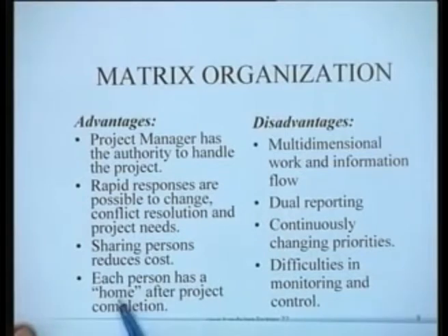Each person has a home after project completion. You see, they say one of the disadvantages of pure project organization is that people do not want to finish the project because they do not know where they will go after finishing the project. So they would like to keep on extending it and would like to stay on in that particular organization. But here the home is defined. You start from your parent department, you are on loan to the particular project, and once you have done it you go back to your parent department and are available for doing other projects.